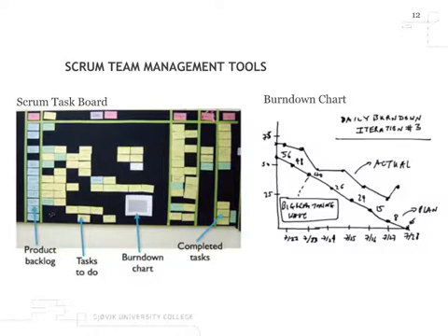If you have estimated these issues, the work still to be done in the sprint will be decremented accordingly to what issues you have resolved. If you add issues, typically you shouldn't do that during a sprint, but if you do, you will see that your burn down chart is rising.